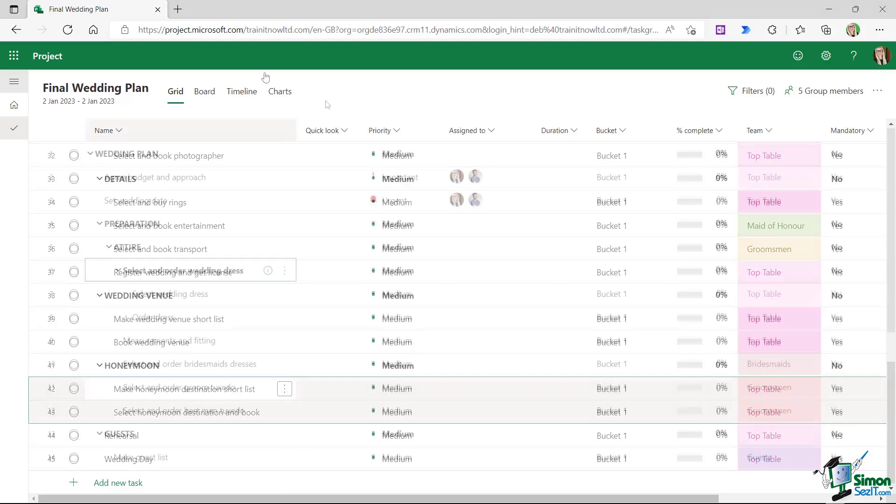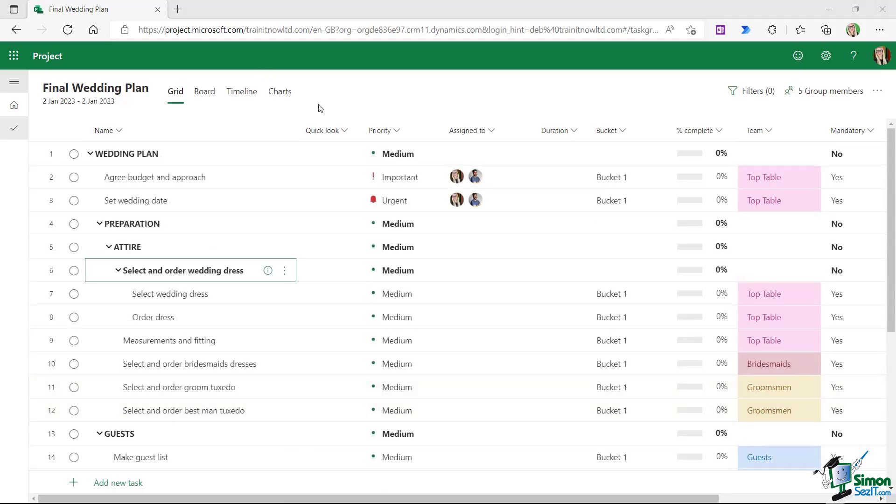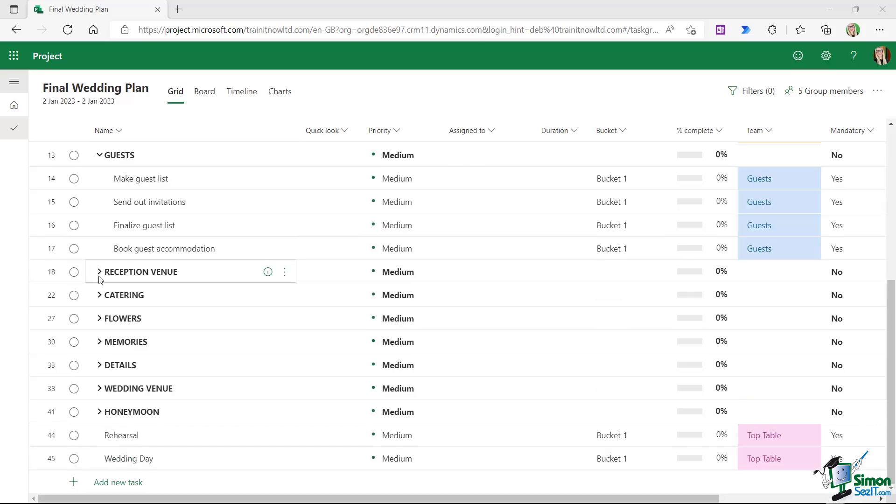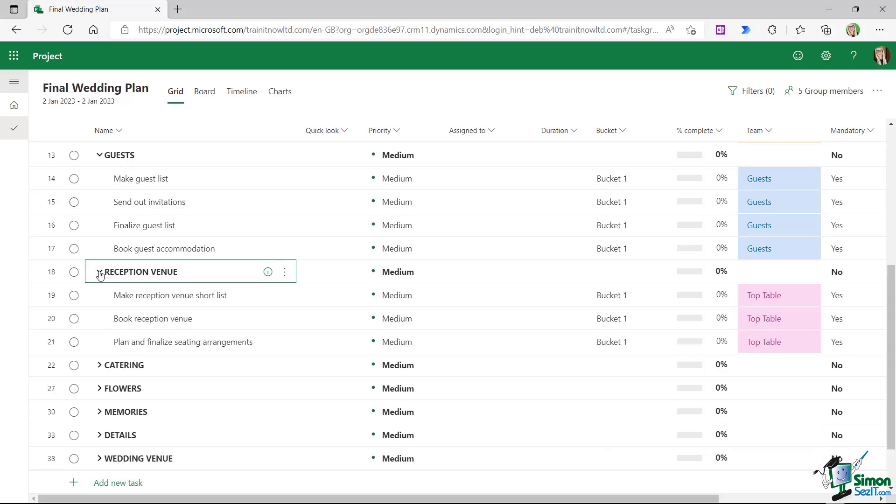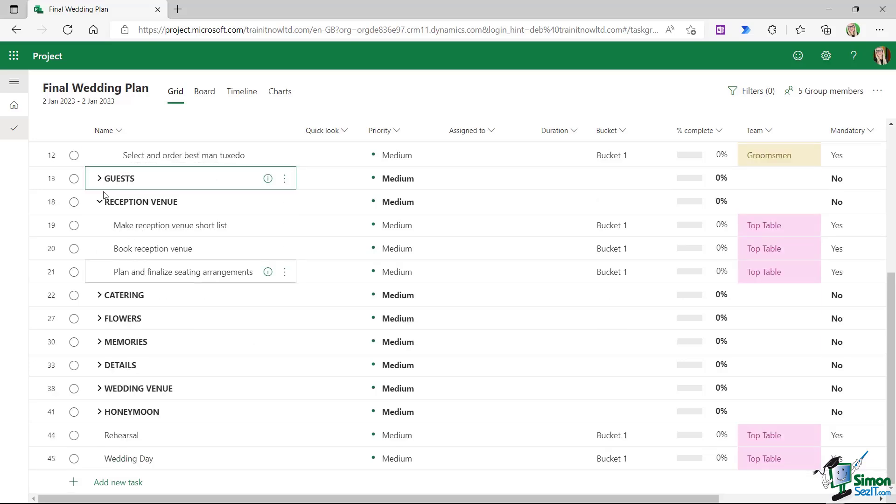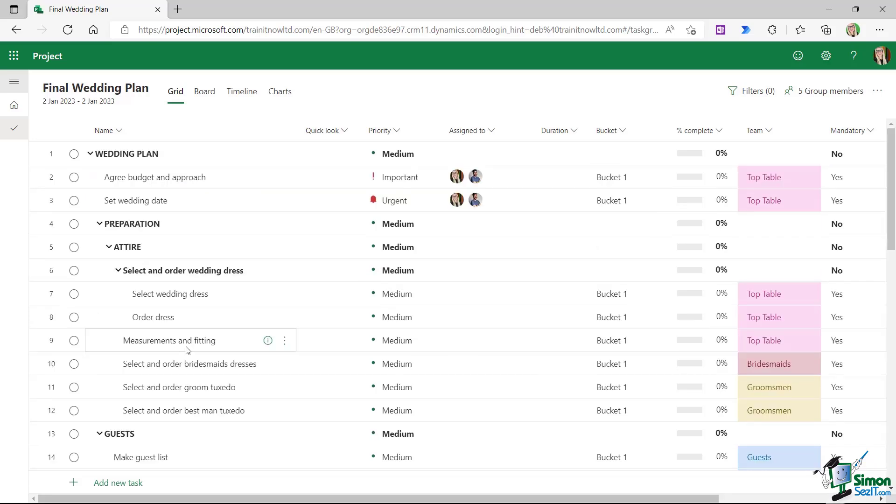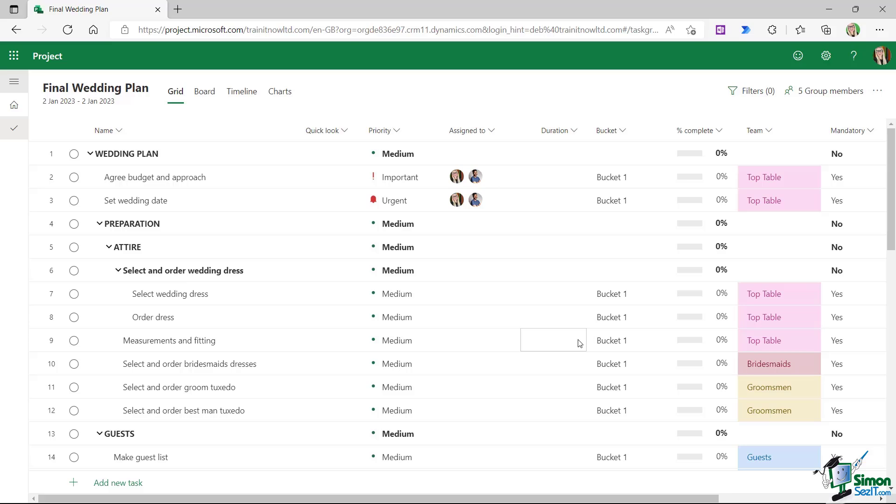So now you can see how these summary and subtasks add a bit of structure to our project plan. And if you want to hone in on specific tasks, we have the collapsible and expandable menus which allow us to focus just on what we're interested in. The final thing to note here is the start and end dates. Notice that those haven't changed, they're still showing as the 2nd of January 2023. And that is because throughout all of these changes that we've made, we still haven't added durations to our tasks. And that's exactly what we're going to start doing in the next lesson.